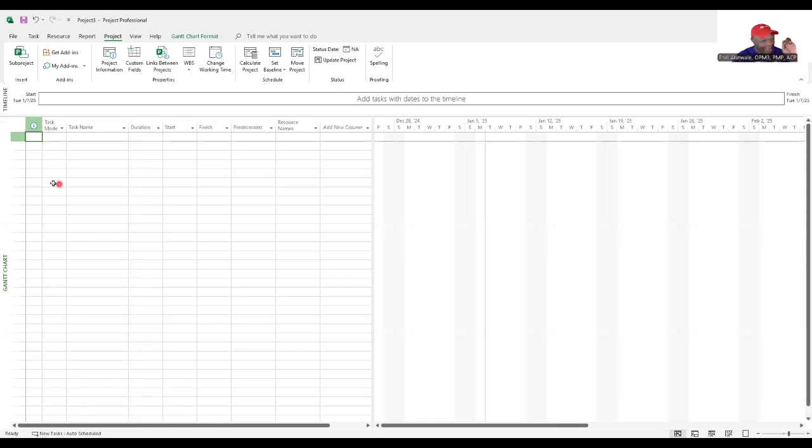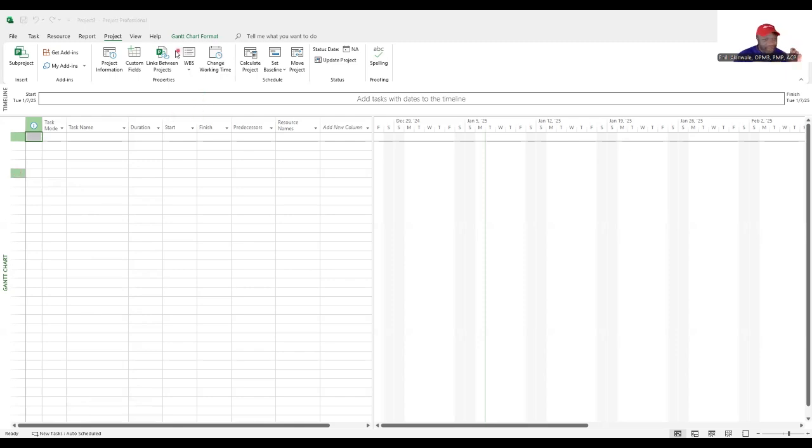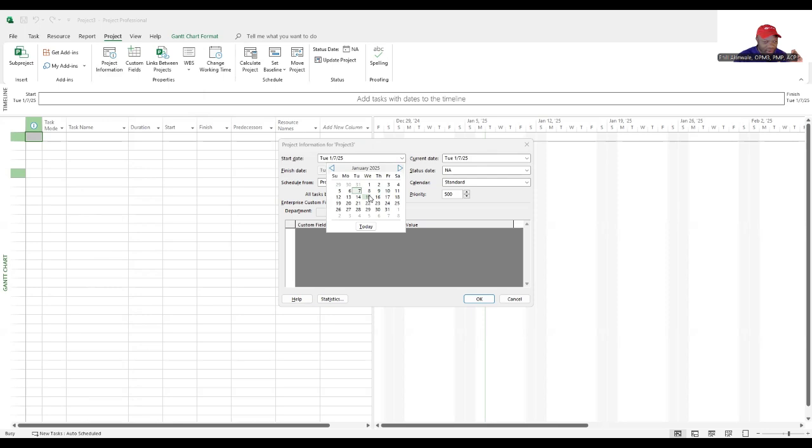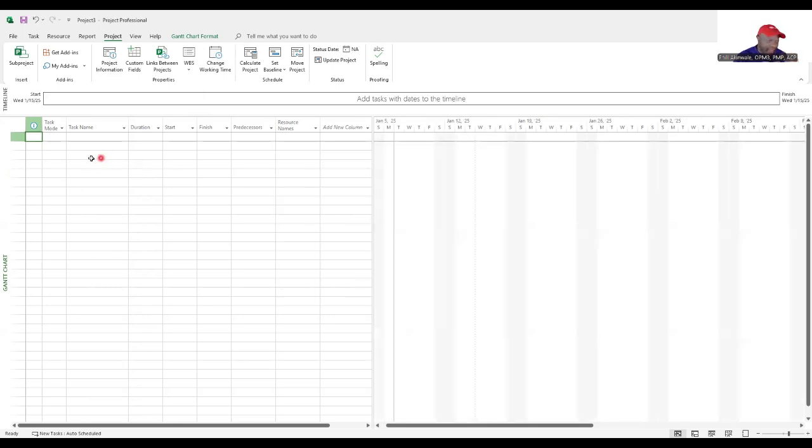The next thing we're going to do is decide what day our project will start. For that we're going to go to project, project information and we're going to choose the 15th of January. Hit okay and now we're ready to put our tasks in.